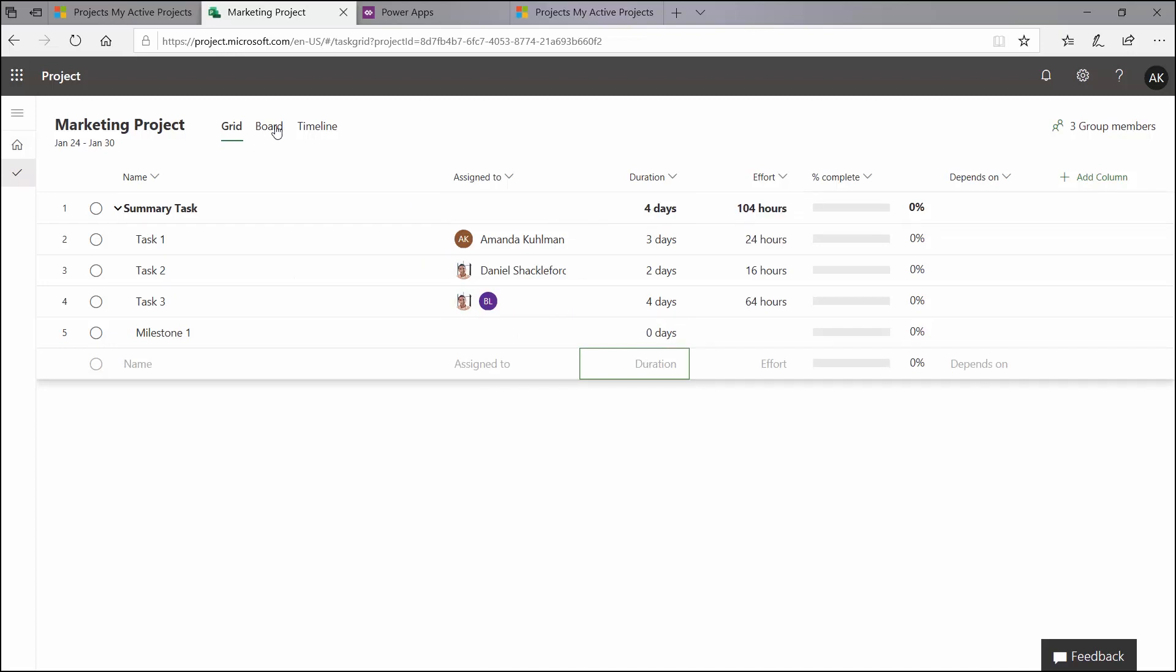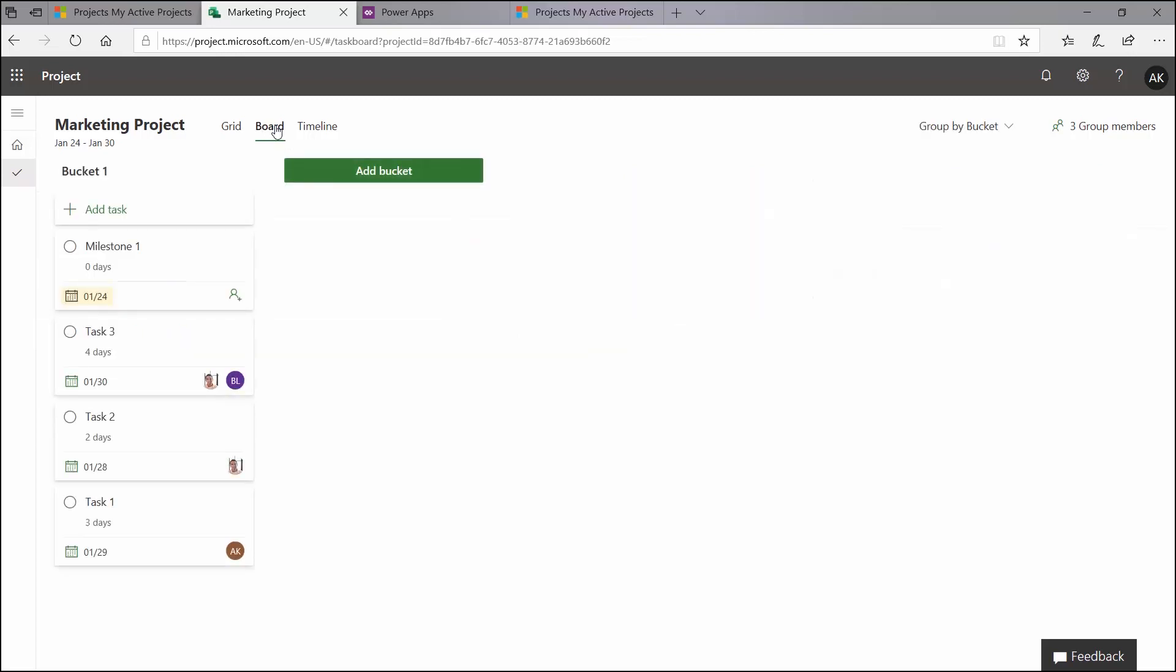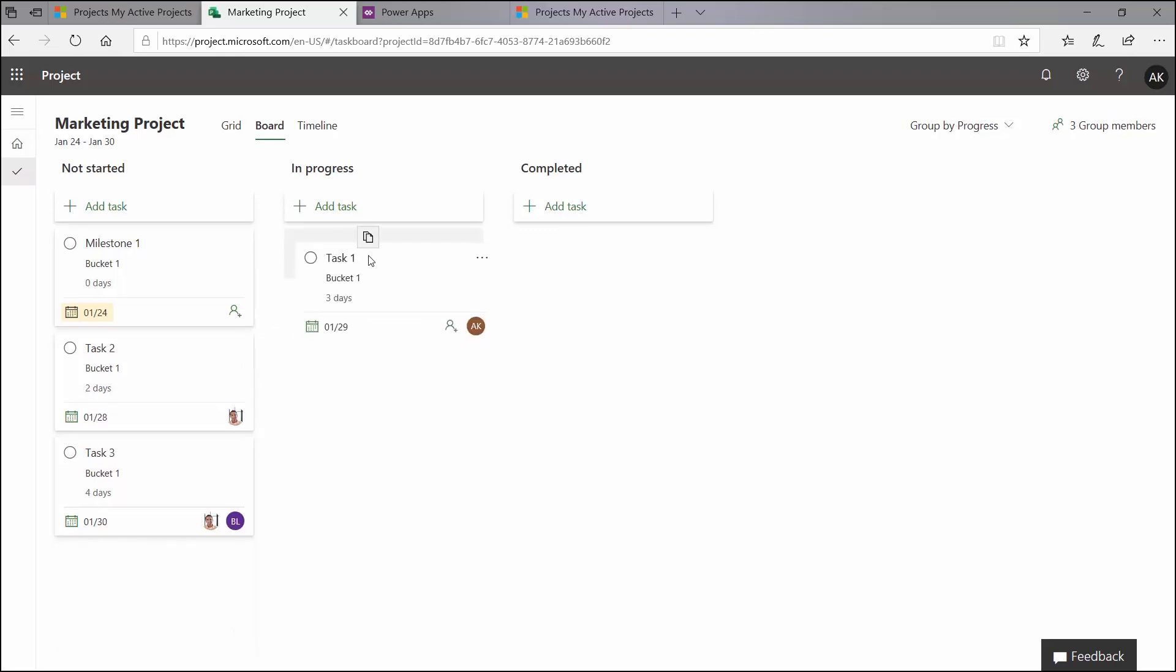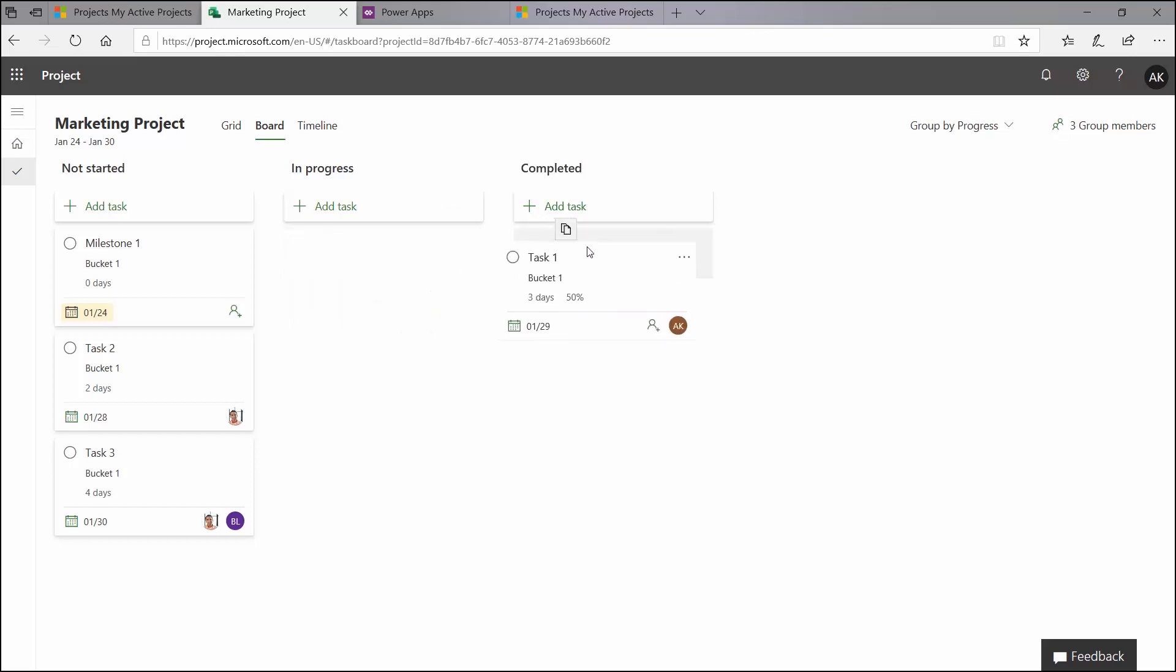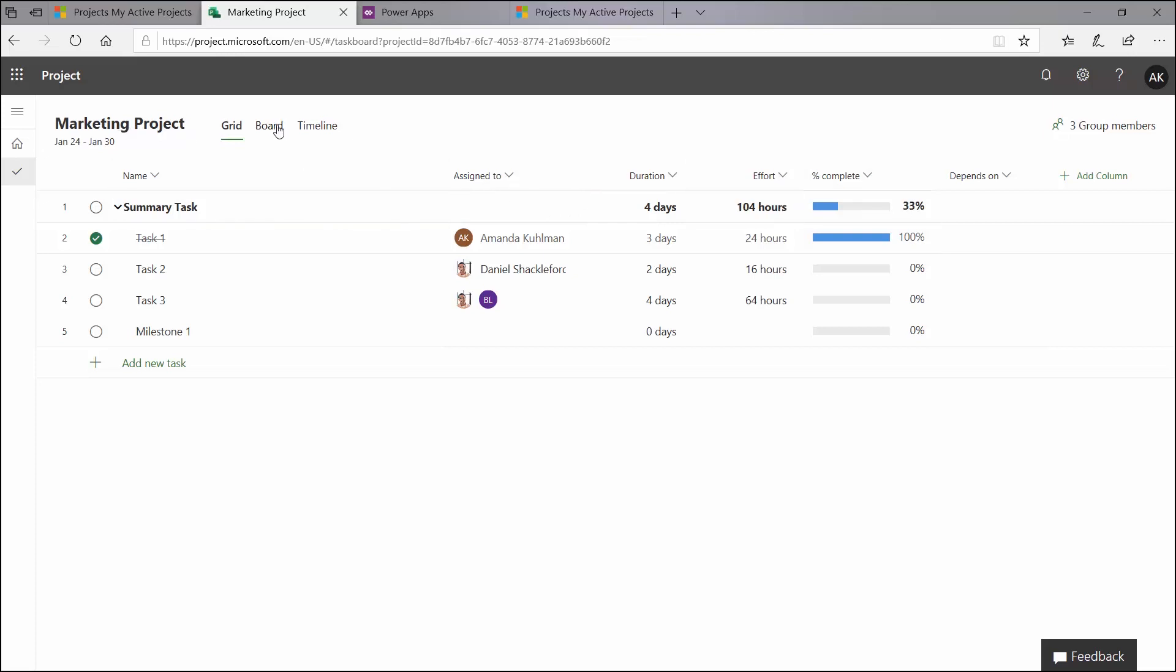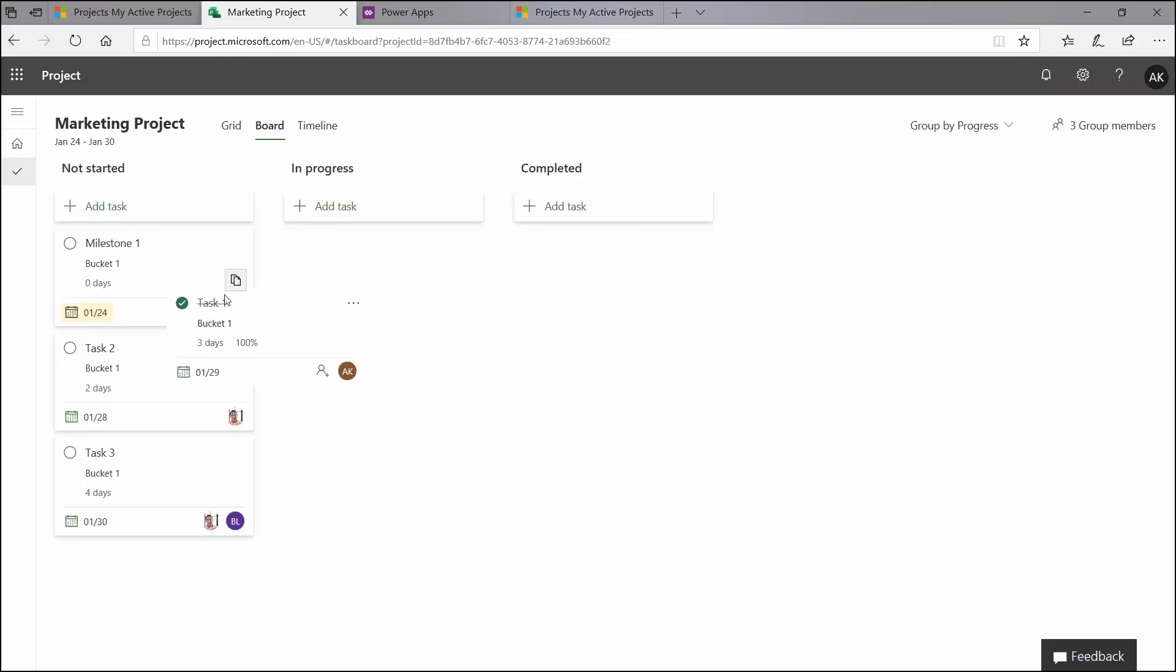So you do have the option to see your tasks in a board view. There are a couple of different buckets or groupings that you can have. By default, there is the progress grouping. And when you do move tiles from one page to the next, you see the progress change for that. For example, if I have my task one here, I do want to move it to my in progress. It updates that percent complete to show me that. Once it's completed, I'm going to move it to my completed bucket here, and it does have 100% there. It is noted by a checkbox and a line through, which is also reflected in your grid view here. You can see 0%. We do have our percent complete column here. It's 100%, which also rolls up to this total summary task up there. We're going to move this guy back over here. And we're going to go to the timeline view.